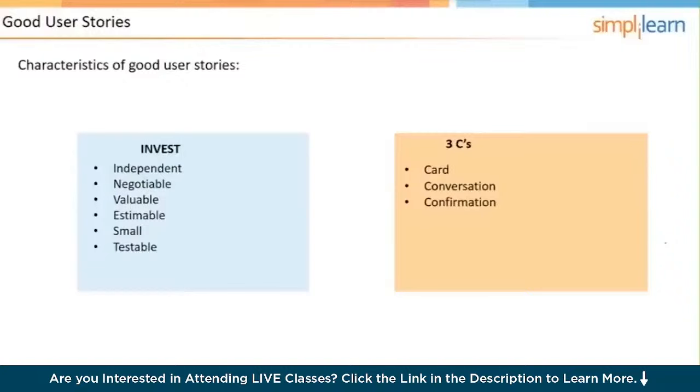I stands for independent. Independent, meaning that each user story stands on its own. When we're doing Scrum, you don't do a user story that won't result in working software. We just talked about the description of user stories, right? So it's a user that needs some kind of functionality for some kind of a reason, and they're all independent. Will they work together?